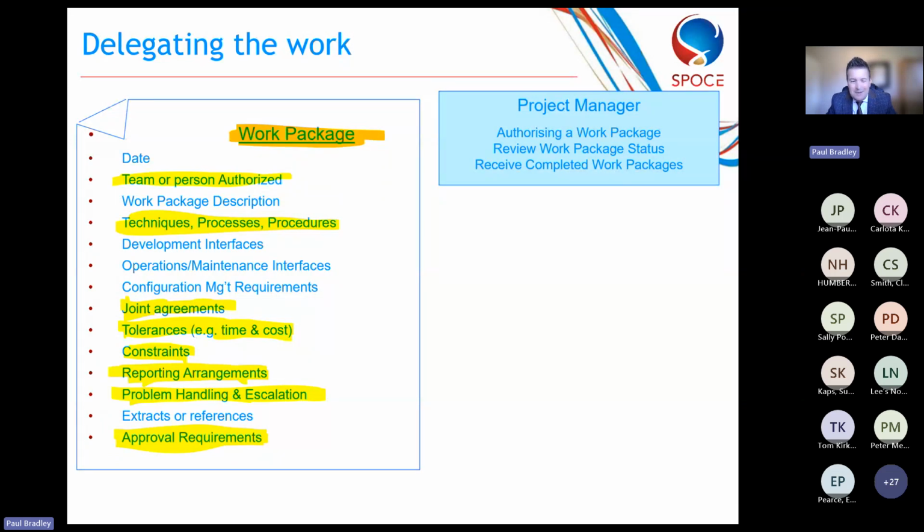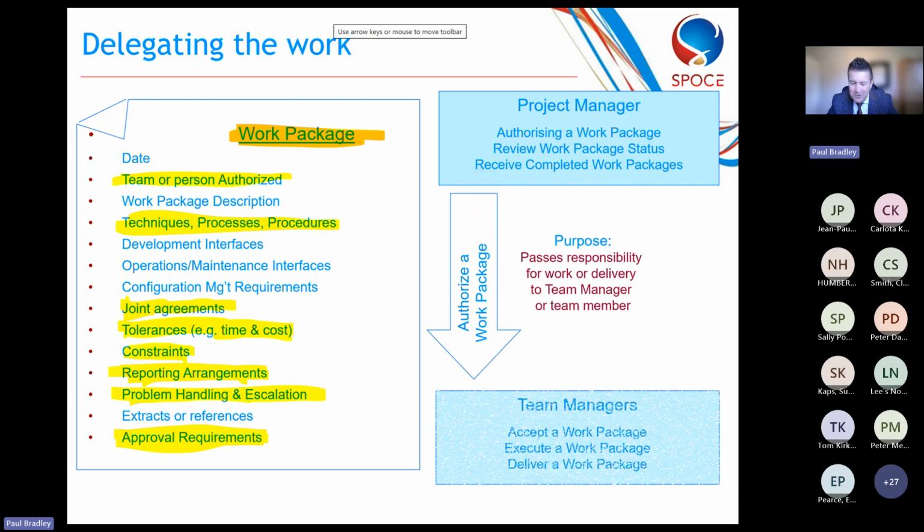And the way this works is you've got the project manager there. The project manager will authorize the work package. Okay, and that means that they send that work package to their team managers. The project manager authorizes the work package and the team manager will accept it. And here is the work package being authorized. And the purpose is it passes responsibility of work to the team manager for delivering that work.